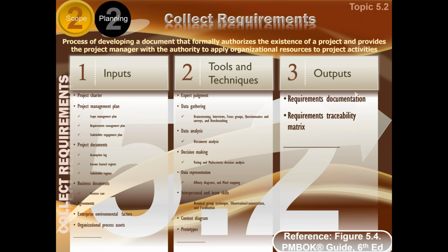The requirements document will include all the requirements collected and confirmed so far, and the requirements traceability matrix would be a kind of table which will show the journey of the requirement right from source till its destination. So we can track any requirement from its source till the activity in which it is to be performed. So far we have not created the activities, but ultimately when the correct activities and the roles are defined, they will be linked with this traceability matrix.